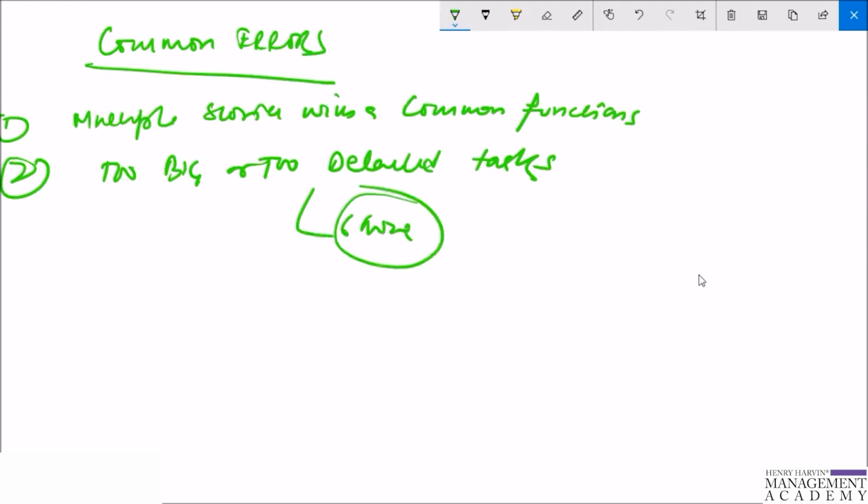So big tasks cannot be assessed properly during a daily time frame, and the team cannot assess how much work is remaining for them. So sometimes this creates a problem if the tasks are too big. So effort remaining and effort spent are misunderstood.